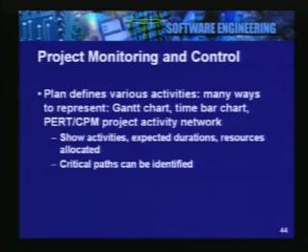In a network of activities like this, we can identify which is the critical path. If we do not meet the schedule requirements for the critical path, then the project may get delayed. So, we identify which are the critical activities and how to keep them under control so that they are carried out in the expected duration and in the expected cost.